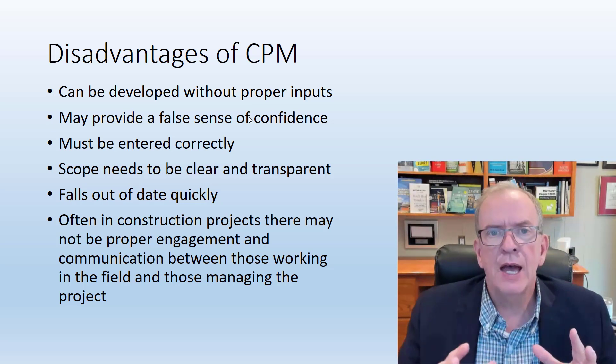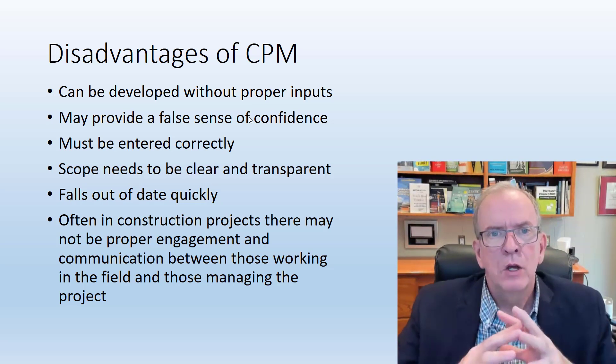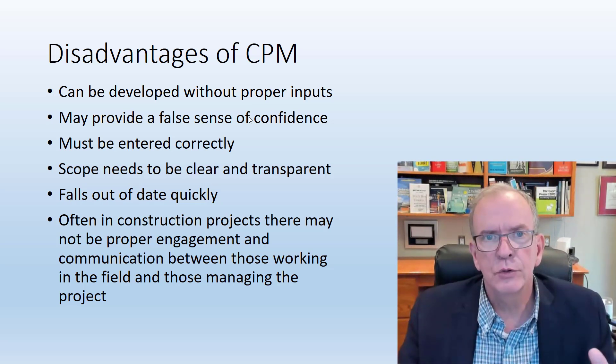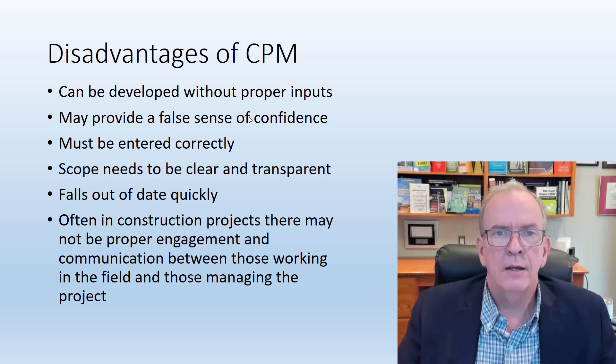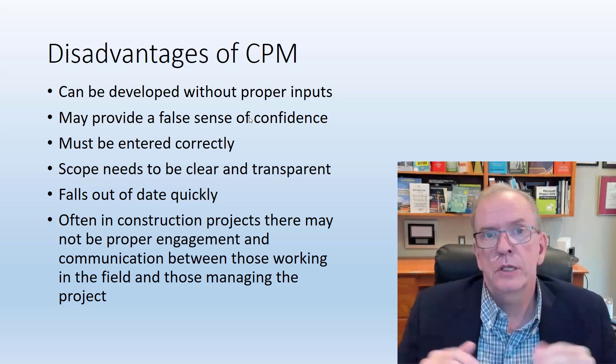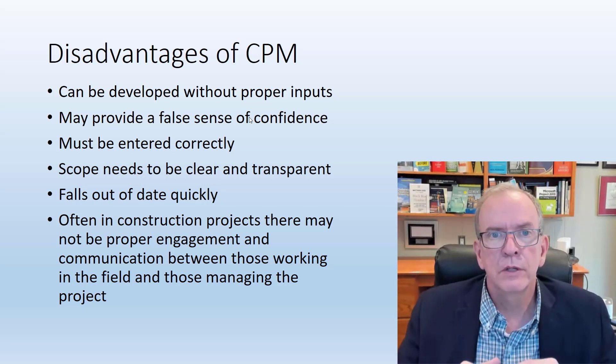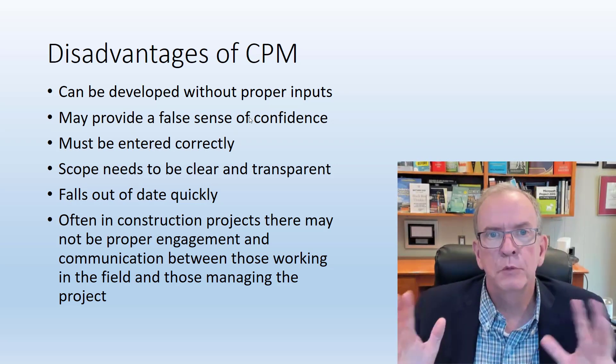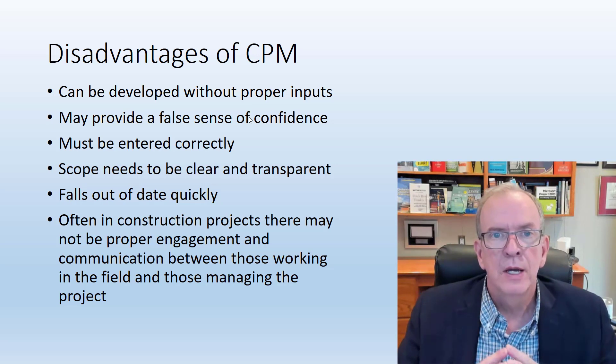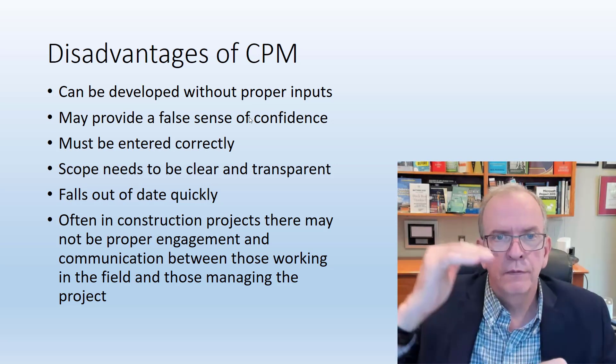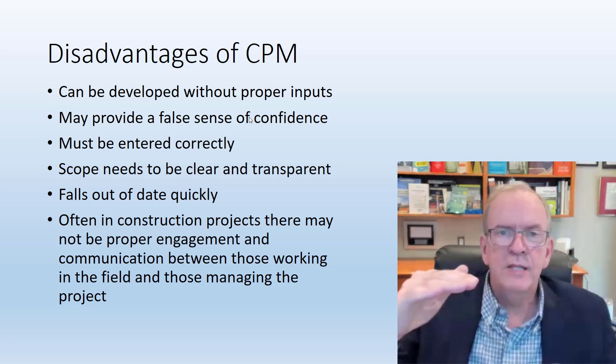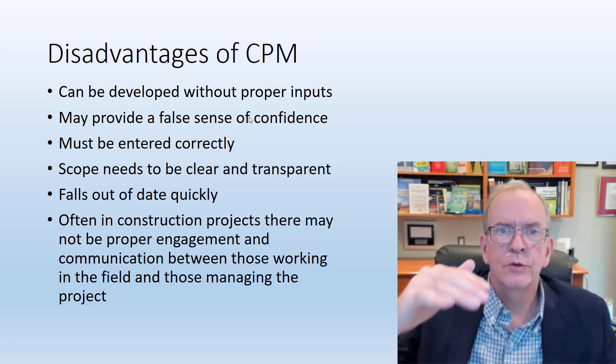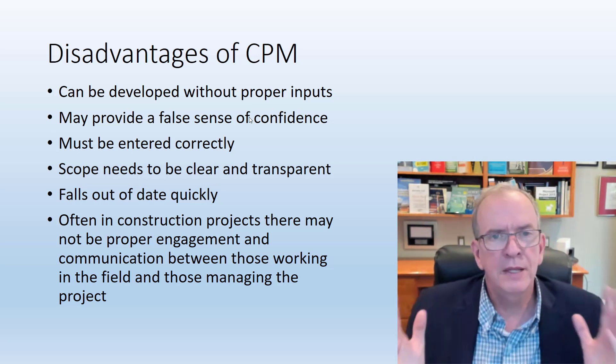In traditional construction projects, we do have some issues running solely with the critical path. We alleviate that by having short-term look-ahead schedules. I personally, in the last number of years have really been waving the flag for lean construction methods, which really takes this to another level with integration and engagement of people.